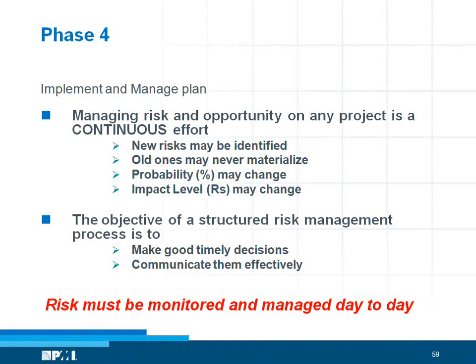It is a continuous process. It's not that you do it one time and forget about it. If you have done it before bidding, then at periodic intervals you are reviewing and redoing the risk analysis. Why? Because some of the old risks identified would have gone away and new risks would have come up. So the new risks have to be identified.